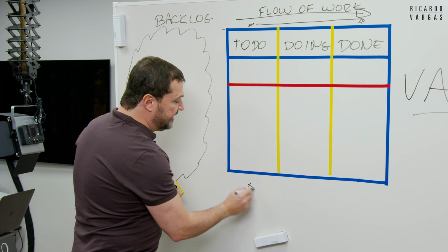What is the secret here? For me, one of the best secrets of Kanban is to know what is the number to put here. It's based on your team availability and the work you were doing. So for example, you can do only 2 tasks at the same time, so I cannot pull anything. I can only pull B, D, or J when I finish I and H. If I cannot finish them, or if I'm late, these will be stuck here and this will be stuck here.